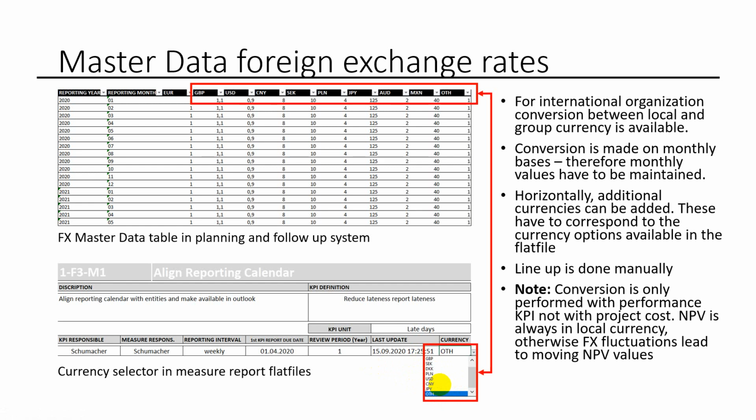Basic calculation concept is that the exchange rates can only fluctuate or vary from month over month. They are calculated always with the conversion rate of that very month where the cash flow occurred, and will not average and will not change with accumulation.